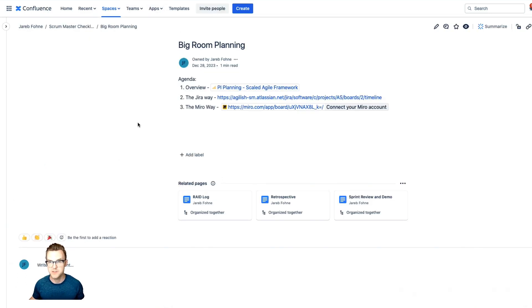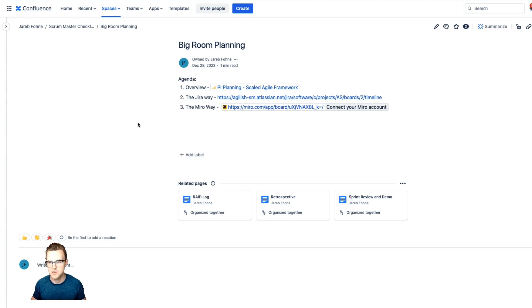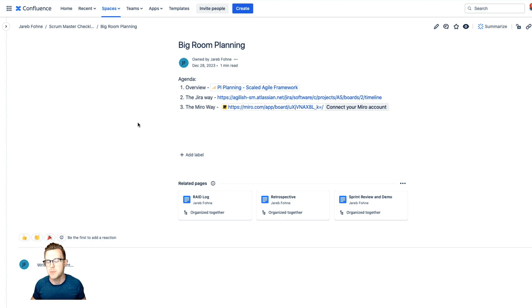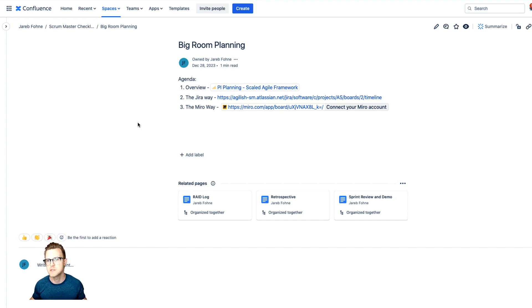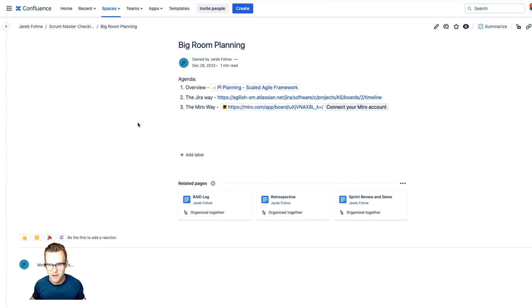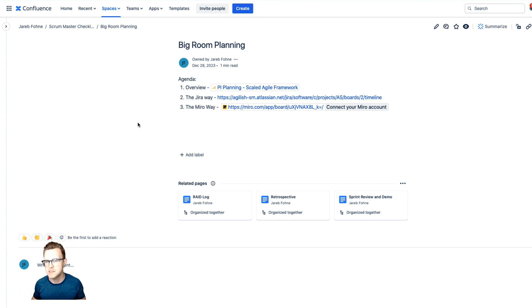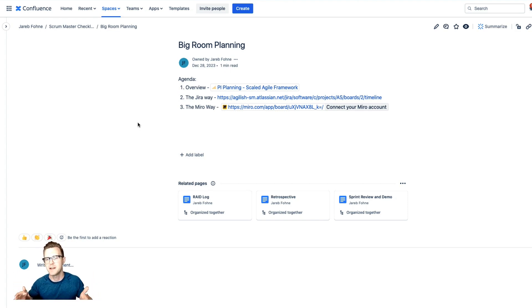So I appreciate watching this video today. This is on big room planning and what some overview and some tools you can use within your teams to do that. If you're doing this virtually, you can use Zoom, you can use Chime. There's a bunch of ways to actually do this. You do need breakout rooms if you're doing it virtually, though. So having separate rooms to separate teams so they can have their independent discussions and then maybe a mutual room that people can jump back in for cross team discussions. You can use pretty much any of those online virtual conference tools. They all work, but that's also needed in the logistics. This is getting very valuable to get that bottoms up approach to planning for that one, two, three months from a top down vision to a bottoms up planning and alignment throughout the teams, identifying risk in advance.